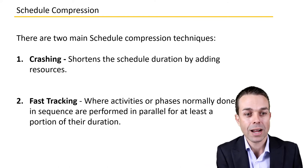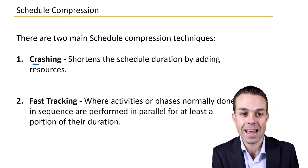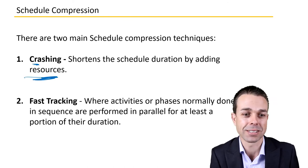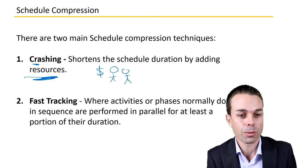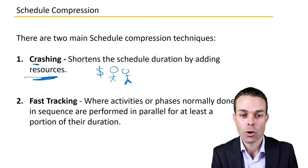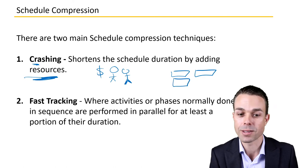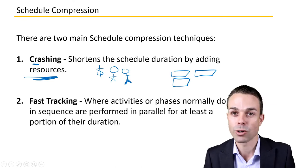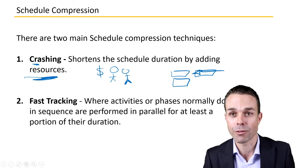Those two techniques are crashing, which shortens the schedule duration by adding resources — which can be very costly since we're adding more people. The other one is fast tracking, where activities or phases normally done in sequence are now performed in parallel, or at the same time, for at least a portion of their duration. That way we're able to cut back on the timeframe.